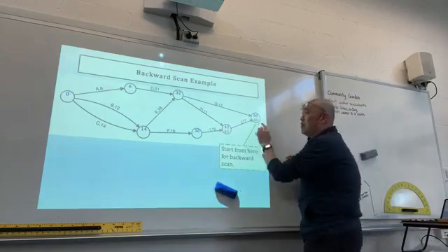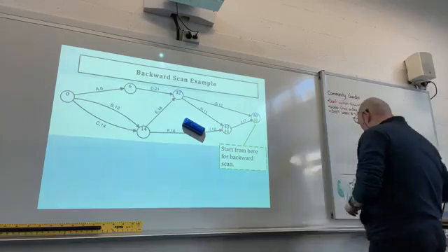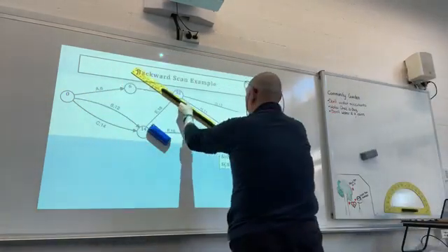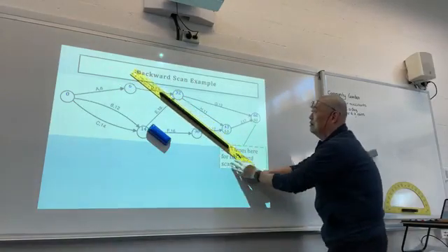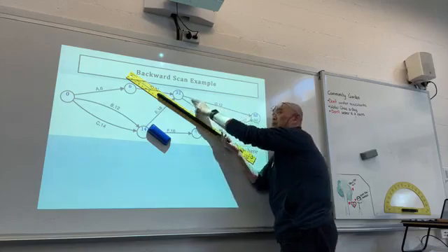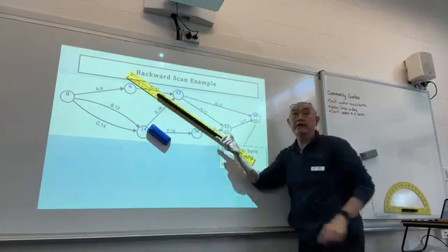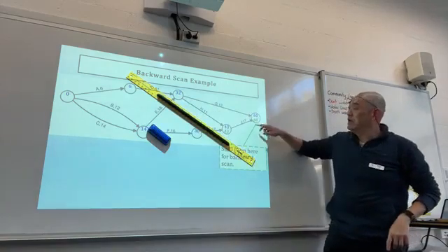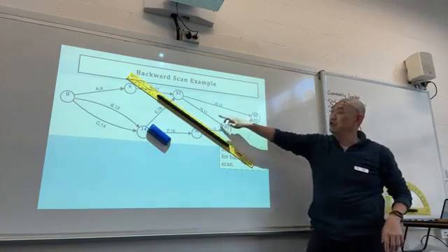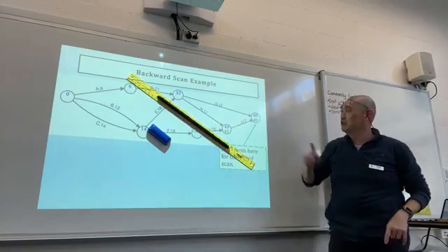Now, to go from here to here, what happened is you do have one vertex going back and one vertex going back there, correct? So here you've already worked out the latest starting time. 43 minus 11 will give me 32, all right?